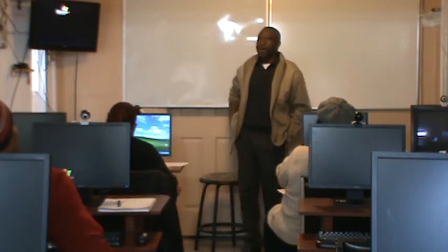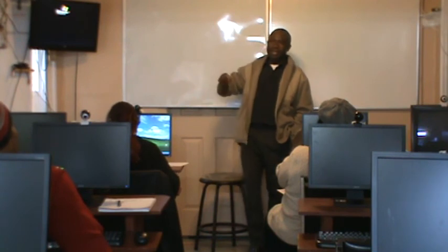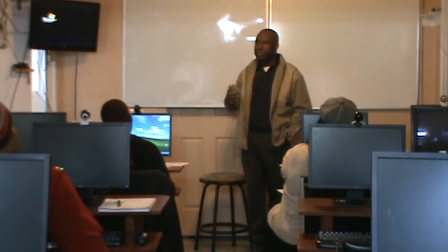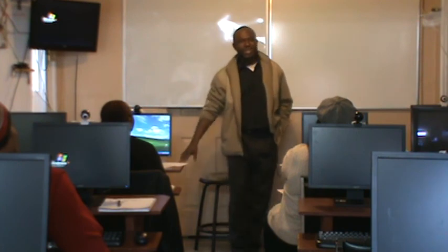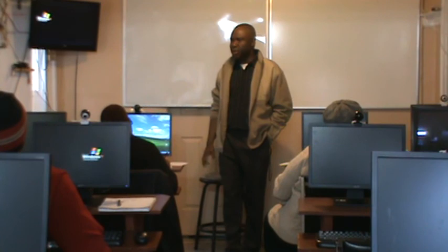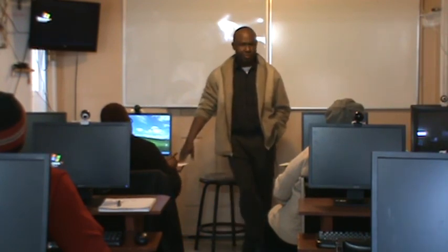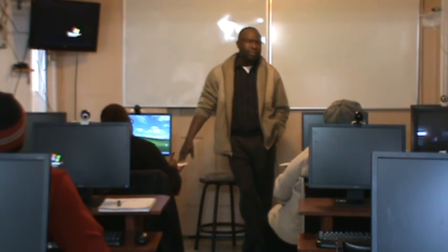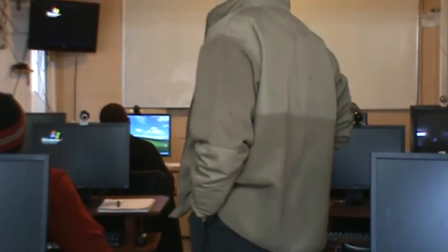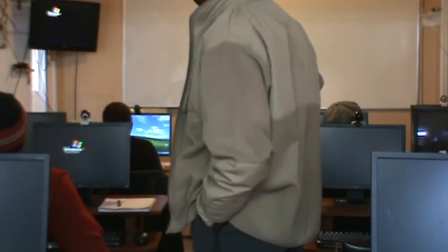Guys, I don't understand how you can forget this one. We said there are risks you can avoid, there are risks you can deal with, and there are risks you have to transfer, guys. You take insurance. You buy insurance. You transfer that risk to another company. For that reason, when you have a house, you buy fire insurance. When you have a car, you take insurance in case you kill someone. You know you cannot deal with that, but you need to have enough insurance to deal with those types of risks. So I repeat this so many times. I feel like you should have that in your head even if you don't do any of your reading. And if you do the reading and you listen to me, you should know this.